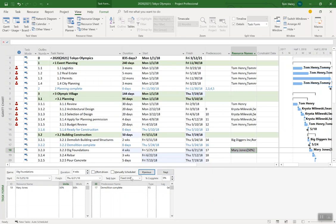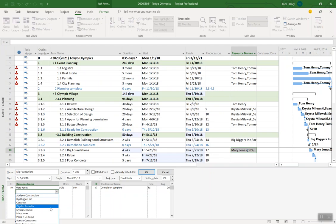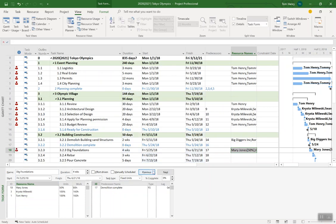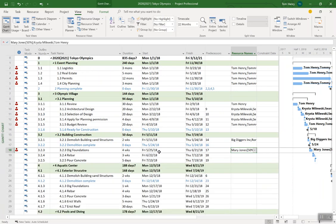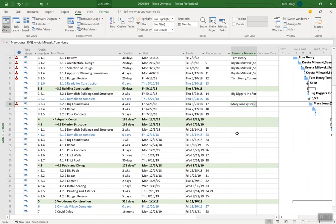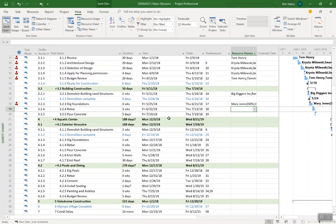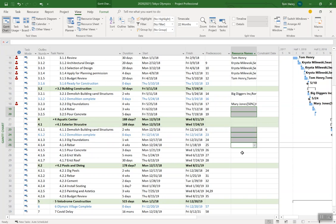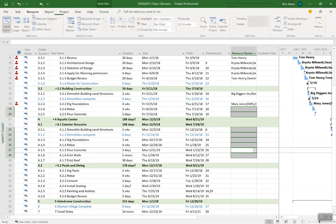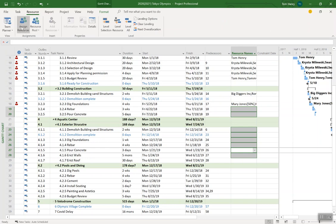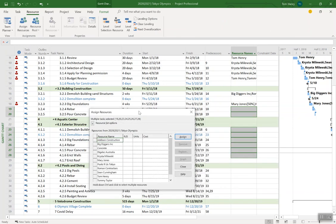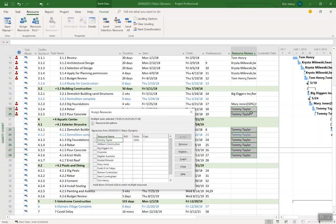This is a great way to come in and quickly assign resources as well. I can do more, let's put Krista on there, let's also add myself Tom Henry and press ok and they're all assigned as well. I can adjust the units up or down using this task form. Now for this project I'm actually coming in here and I just want to get real quick and dirty and assign to a selection of tasks myself, Tom Henry. We come in, click on the task here, hold down the control key and I'm going to select a selection of other tasks, not that one, there we go. So I've selected a few others. Now I'm going to come to the resource ribbon and click assign resources.